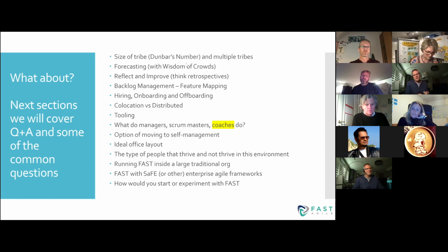We say, hey, 50 people, there's a backlog, go work it out. And so then we form sub-teams from that. And those teams are very much Scrum teams. And in fact, during the iteration, you can do Scrum. You can do Kanban, you can work from home, you could all go work at the local Starbucks, you can do whatever you want. But you make a team agreement before you start work. You go, hey, we're a team, we're together for 2 days. How do we want to work? Hey, we're going to do mob programming, we do pair programming.